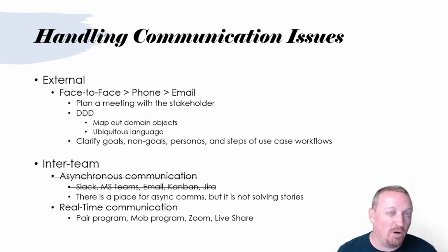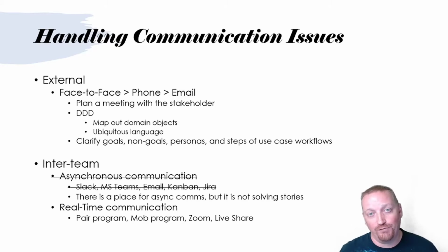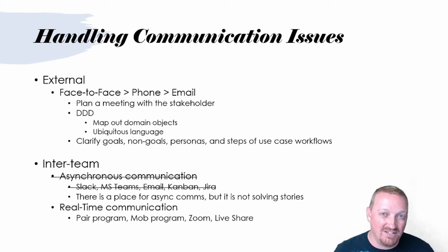All I'm saying is that probably should not be tracked in the system, because we're tracking story points in order to determine the effort and track the work being done for producing some sort of value to the customer. And if it's a spike that is just for your own self-edification and has nothing to do with any effort that's undergoing for the customer, then it probably doesn't need to be tracked. It doesn't need to be something that's in the system.